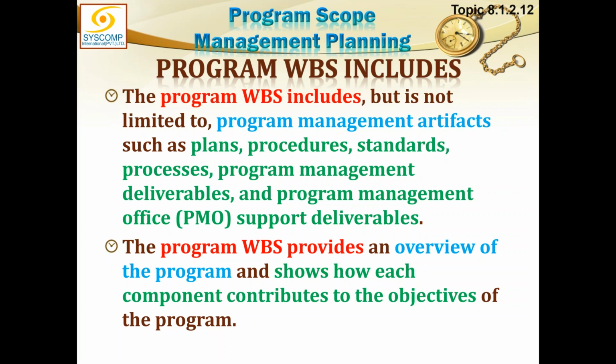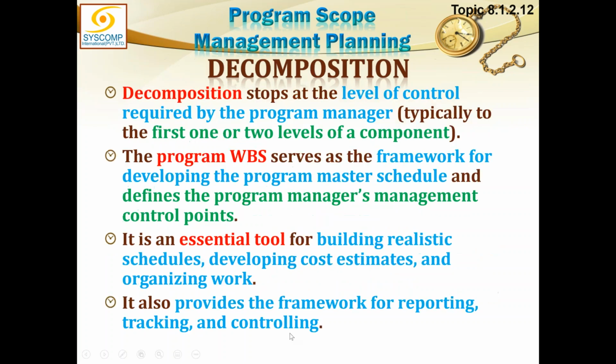It will include development of anything related to the program, and components may also be part of it. The program WBS provides an overview of the program and shows how each component contributes to the objective of the program. Decomposition stops at the level of control required by the program manager, typically the first one or two levels of a component.